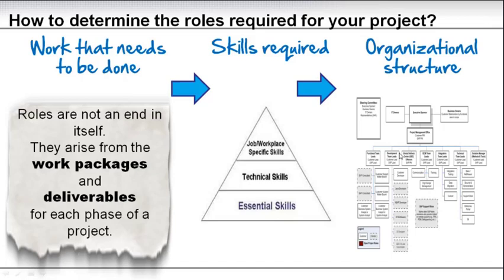So if you have a team lead role or higher, naturally you want to look here: essential skills, leadership skills are important. Whereas if you have project members, they need to be very technically proficient in order to do the task. So you need to take into consideration, after you get the scope and the deliverables, what skills do I need, and do I need to focus on specific skills if I plan to put that person as a team lead, or is it just purely the technical or functional capabilities of the person?